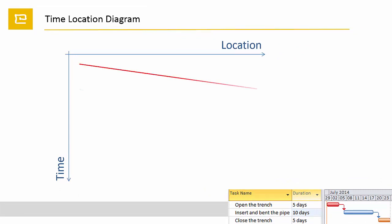First the trench is to be opened, then the pipe has to be pulled down and bended, after that the trench gets closed. Three linear activities that are following each other, but normally not as a finish-start dependency in the way the Gantt on the bottom displays, as there would be too much loss of time.